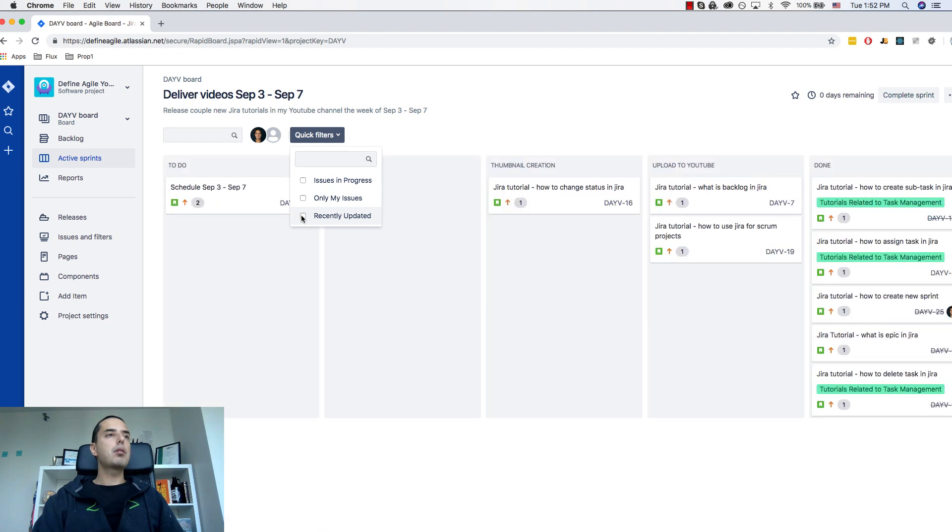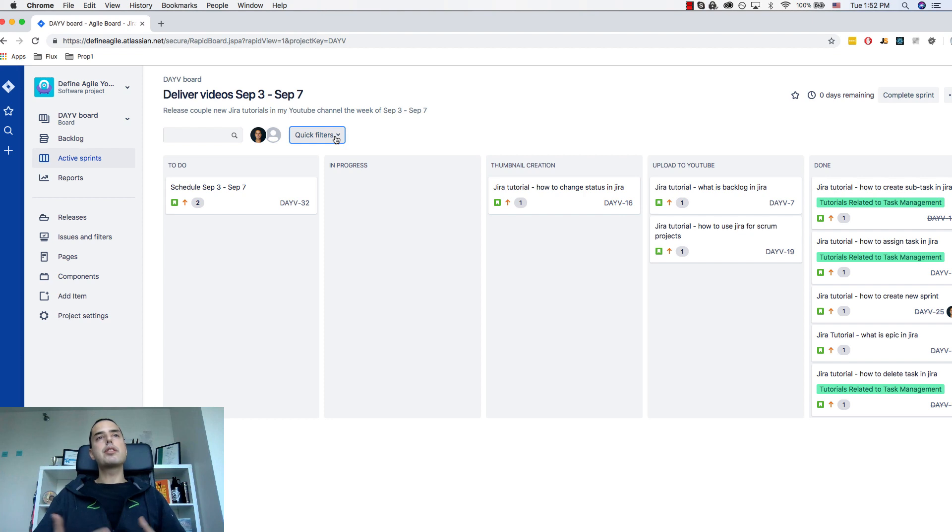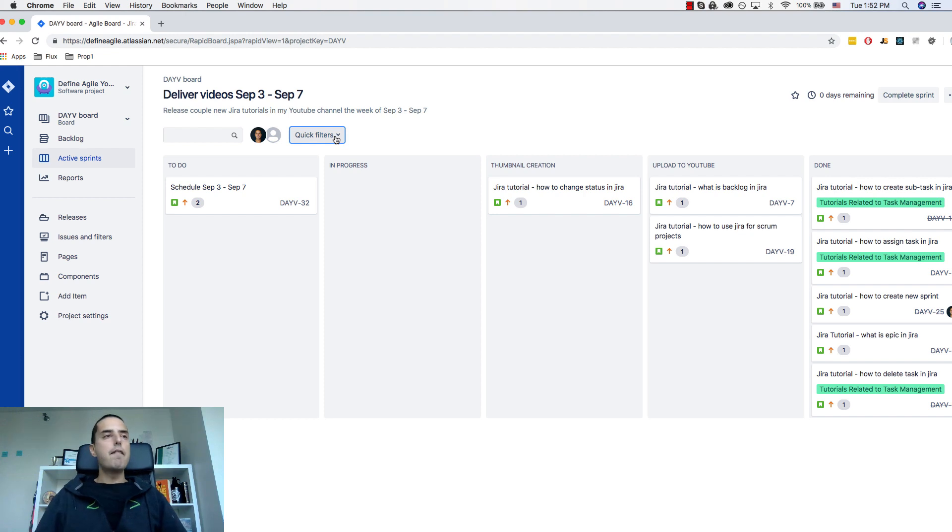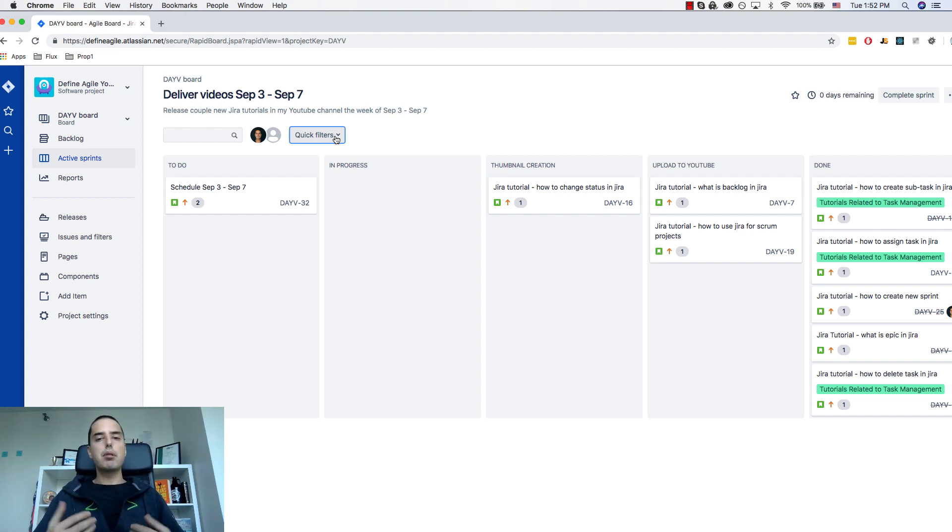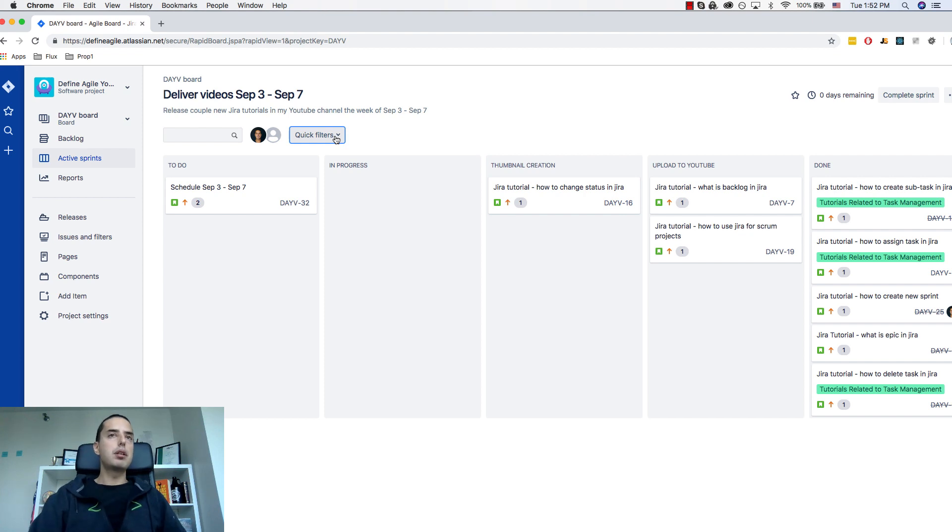So we want to create a new filter and we'll create a very useful filter, the one that will show us stale tickets. So tickets that haven't been moved at all for extended period of time. Very useful in your standups. You can look at this filter and say okay what's happening with those tickets, why are they staying in their column for so long. Okay so let's do it.